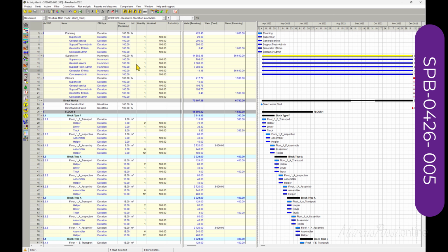You do not have to assign a generator and calculate how many liters of diesel you will use, then assign diesel here and water here. And remember that the supervisor drinks water too. It's automatically updated because you have configured that.